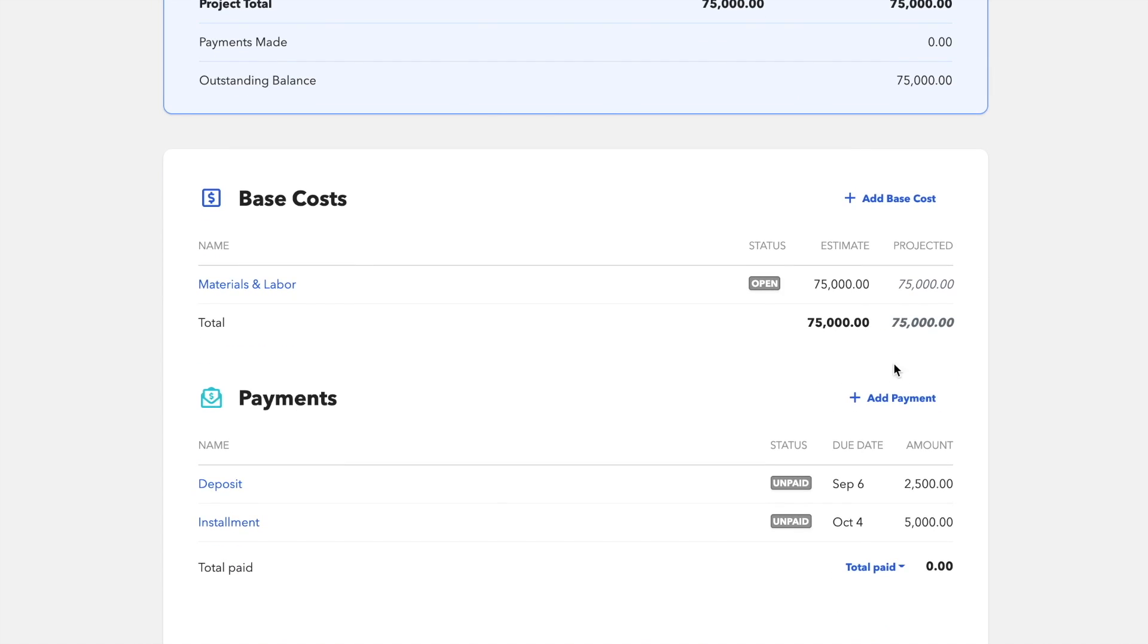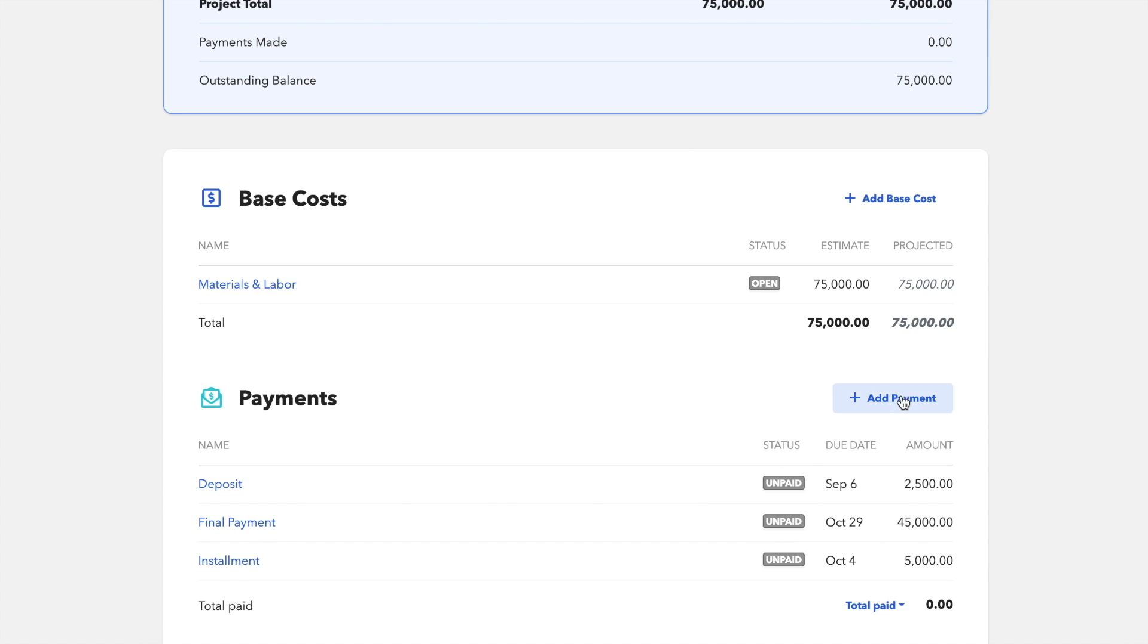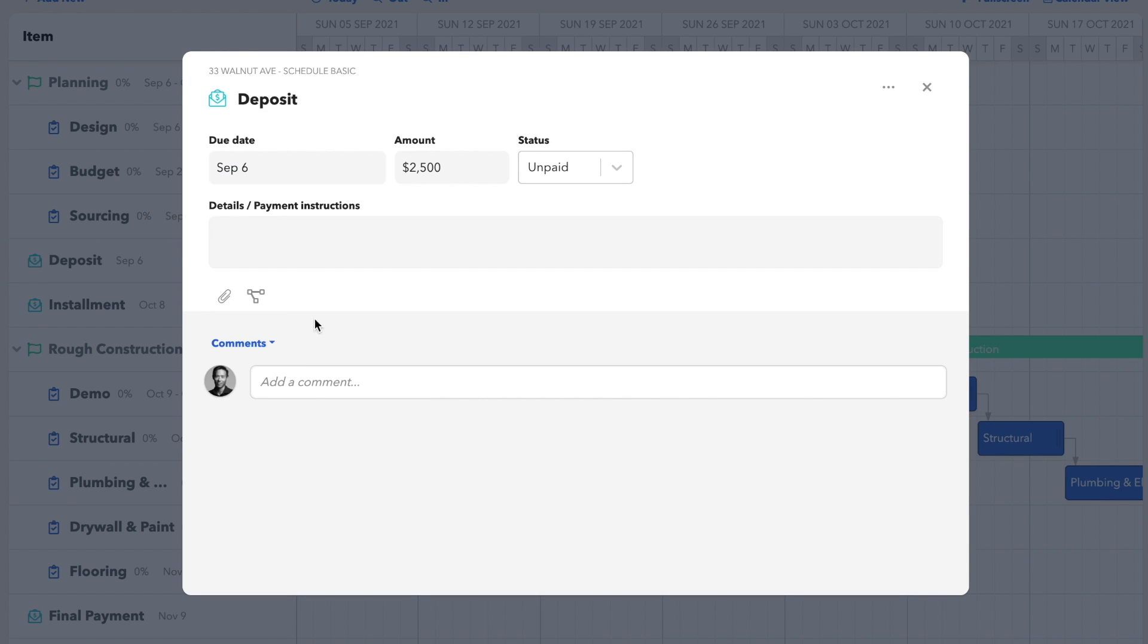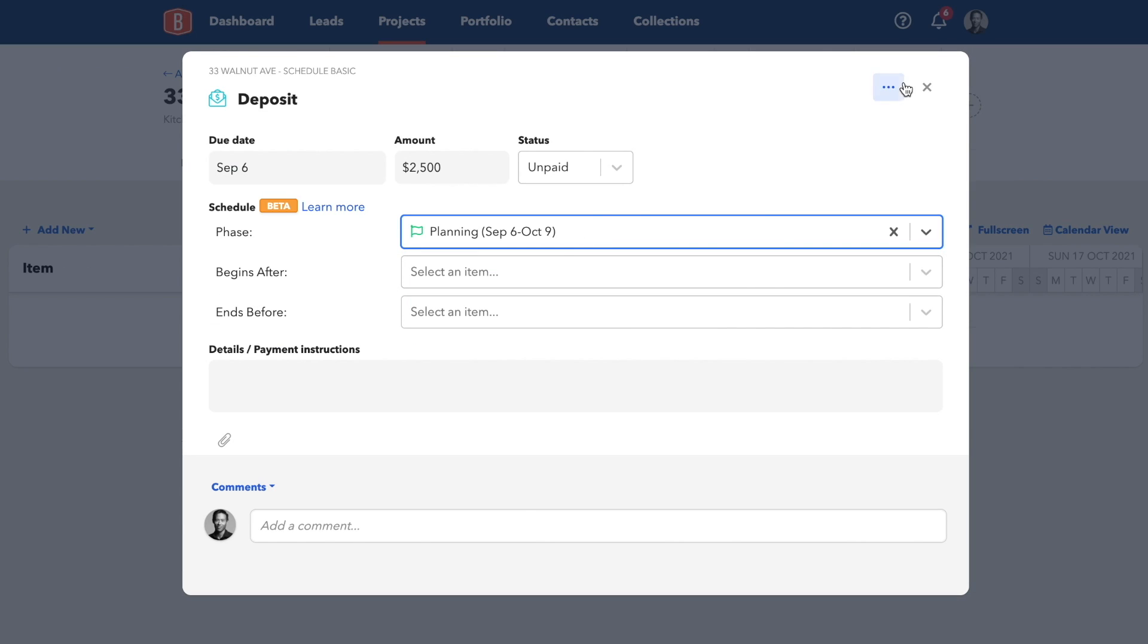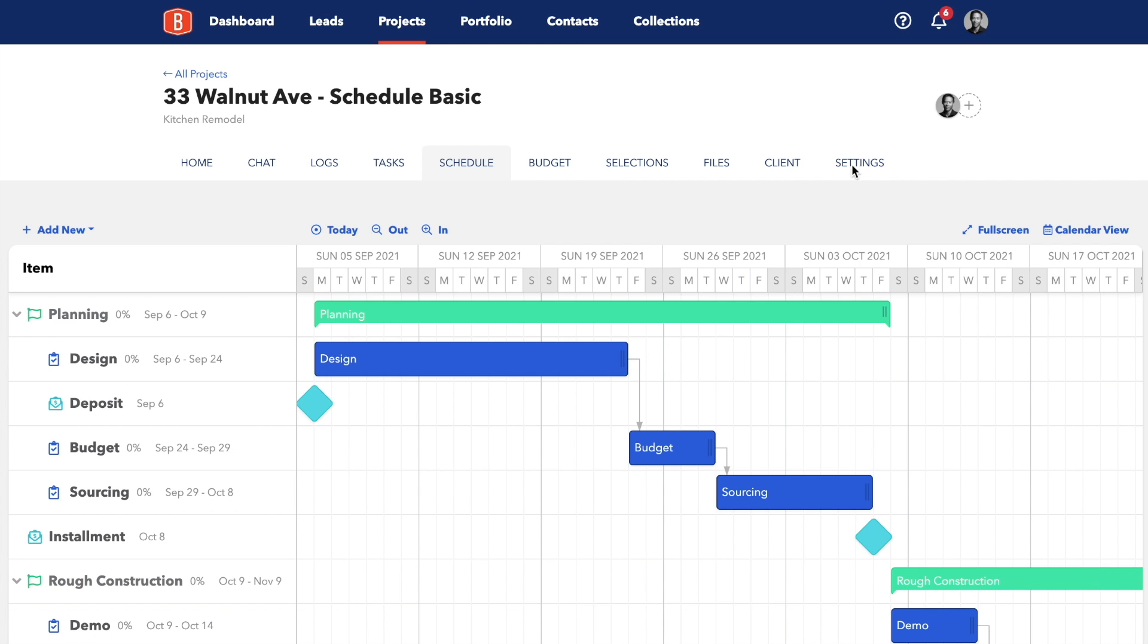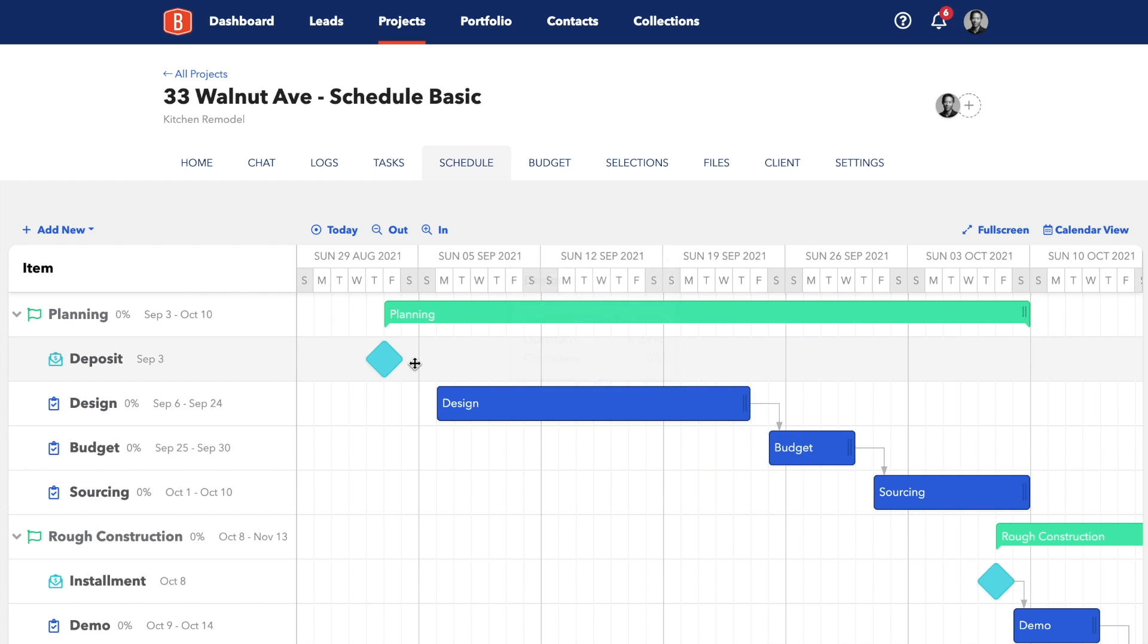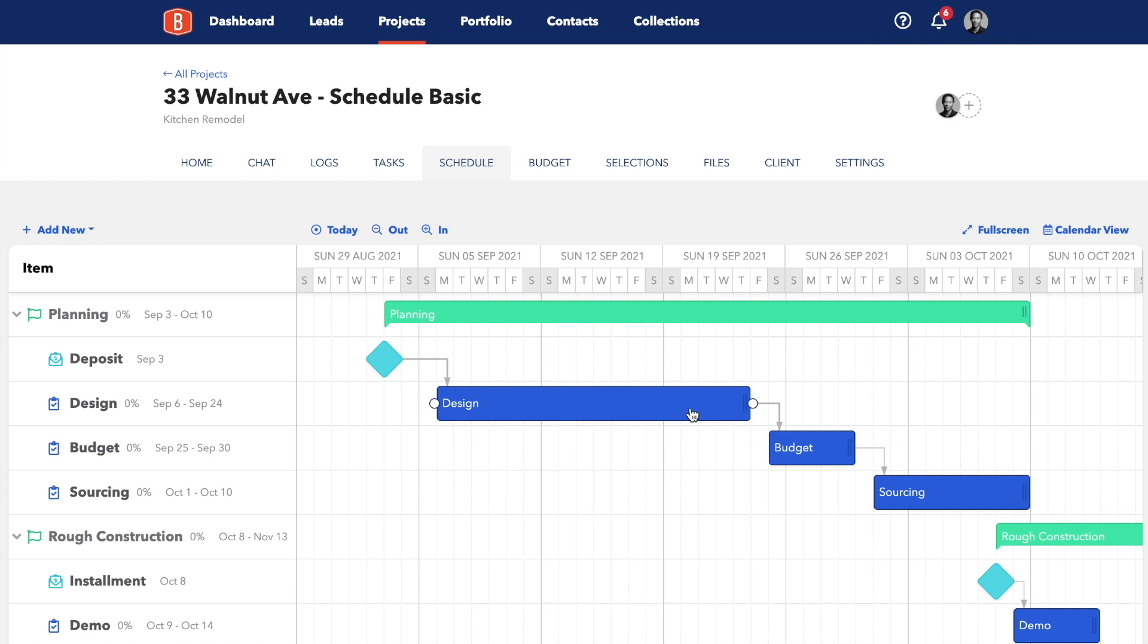We'll do the same for an installment and a final payment. On your schedule, you'll now see some new elements appear, and you can move them to key positions on your schedule. Then you can add them to a phase and set dependencies. For example, we'll say that construction won't begin until the first installment is paid. And also, we're not starting to design until we get a deposit.